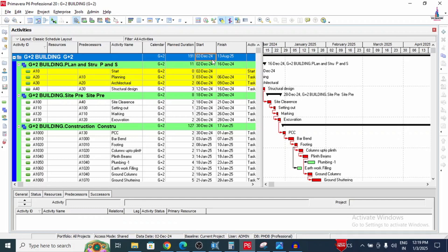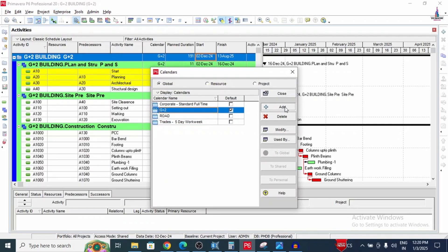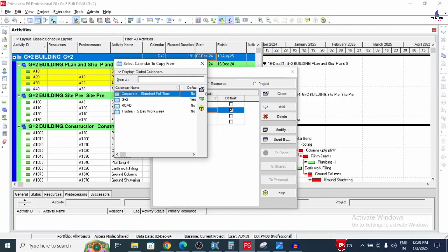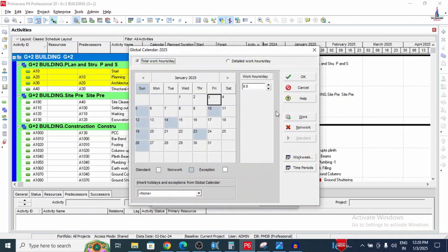To add a new calendar, go to the Enterprise option and select the Calendar option. Click Add to add a new calendar. I'm naming this calendar '2025' and selecting it as the default calendar. To modify it, go to the Modify option. Here you can see I have already added some holidays for 2025 as per our project requirements.